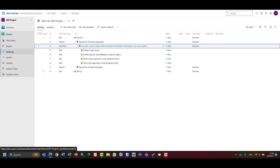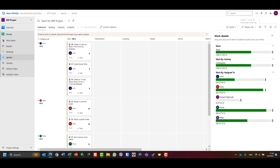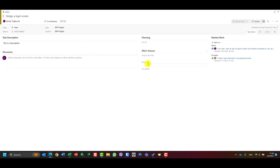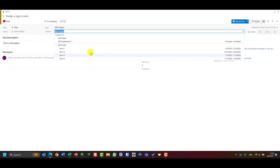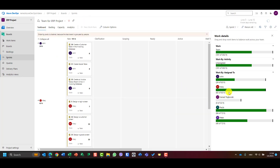I see 'Design a login screen' in the backlog. Let me open another tab — duplicate tab — so on one tab I'll have the screen to see capacity, and on the other I'll have the backlog. Mary is the designer, and Mary has only three hours remaining. Design a login screen — three hours are enough. So I'll set original estimate to three hours, remaining estimate three hours, assign it to Mary, and move it to the sprint. Save and close. Go back, refresh, and see how Mary is doing — Mary is full. Great.